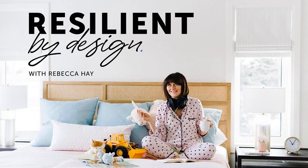What it allows us to do is to move faster, and we always can circle back to the main design and say, well, this is the reason why. See how it works together? We also include the design package in our site binder so that the contractor also sees the vision, as opposed to the contractor just looking at the drawings. It's helpful that they can get a sense of, oh, I see where you're going with this. Because sometimes trades will question, right? But when they can see the whole package, they're less likely to question your design selections.